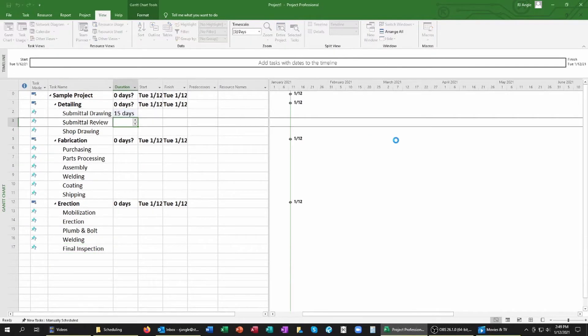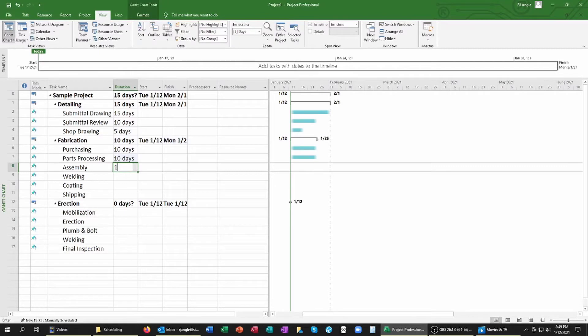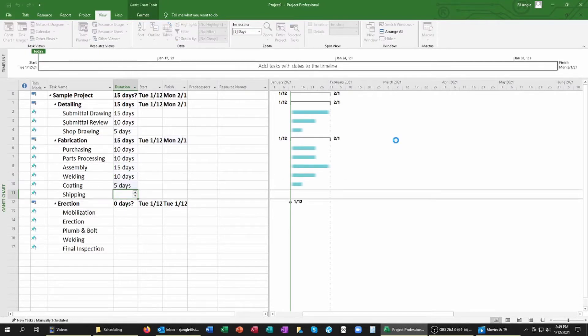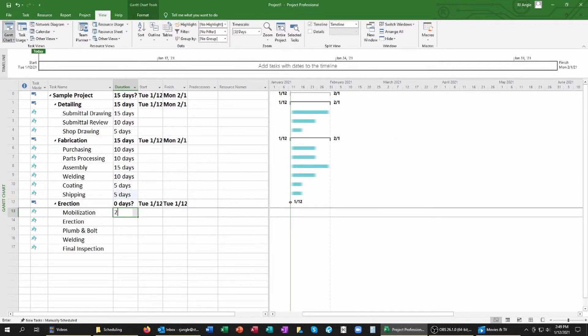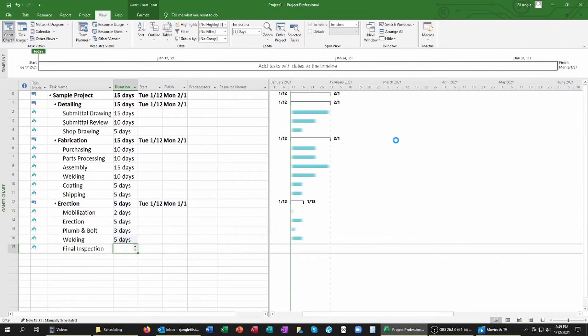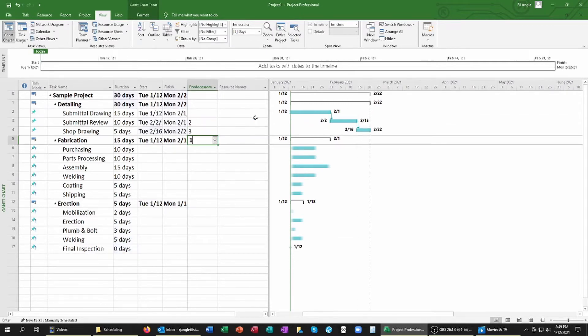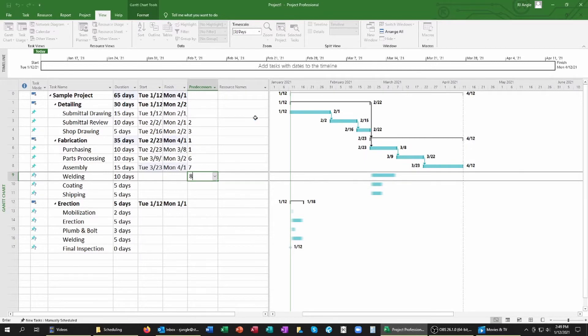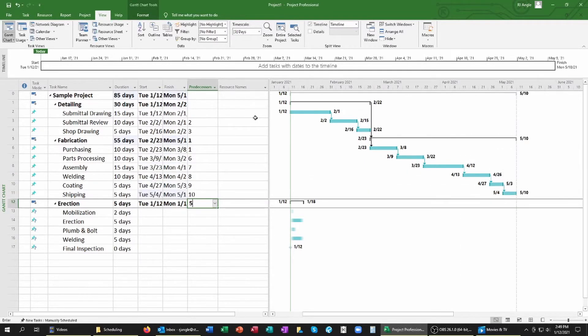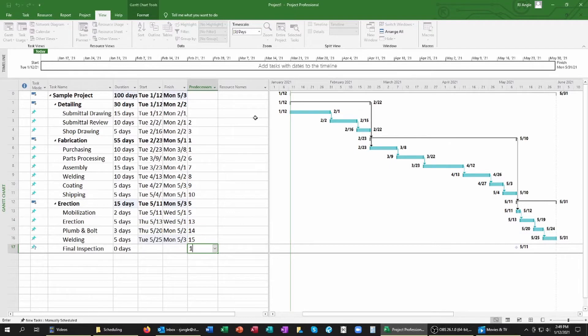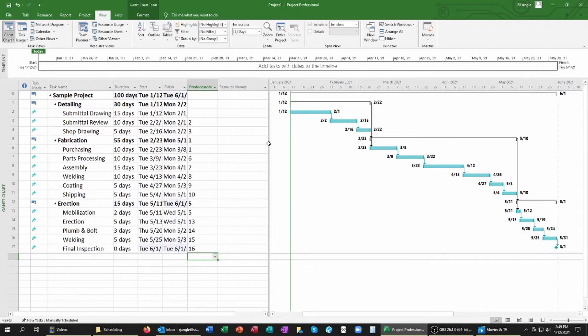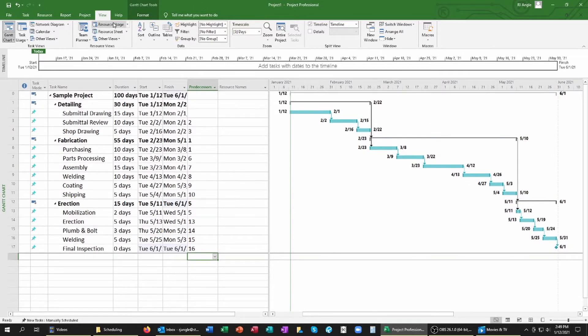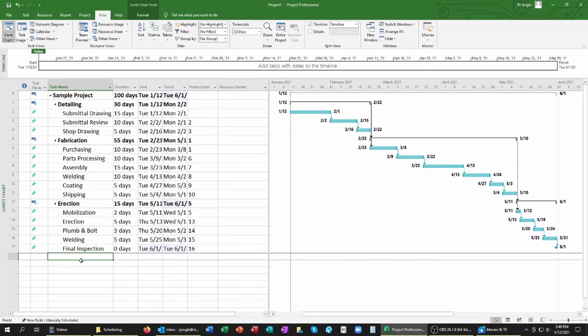After identifying the list of tasks on your project, the next step is to simply assign the duration for each one and the relationship between them if any. Falling back on my comment earlier on the competing interests of schedules, your preliminary schedule usually appeals to your production staff because you haven't yet coordinated this with the needs and expectations of the general contractor. Rather, you're just evaluating resources without limitations as a starting point. After you've pulled all this together, you now have a topic of discussion with the general contractor of coordinating schedules. So let's take a look at that.